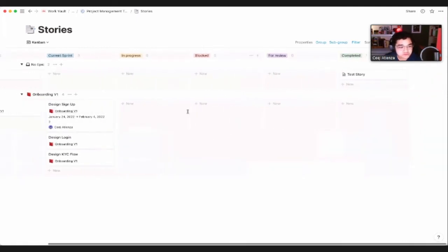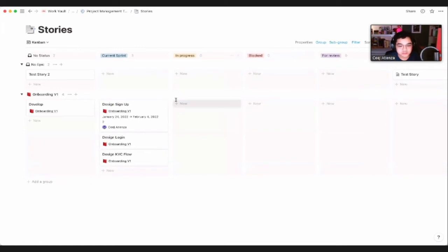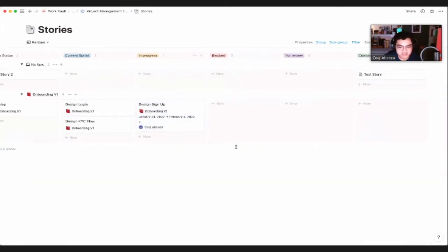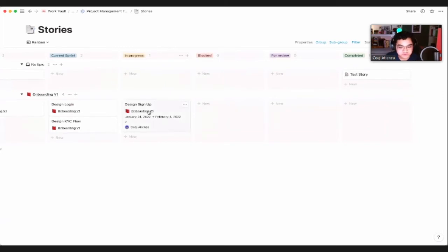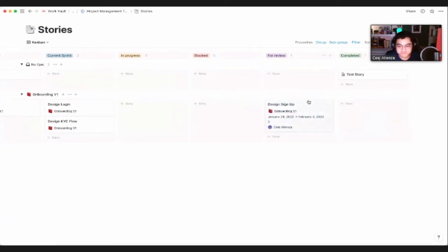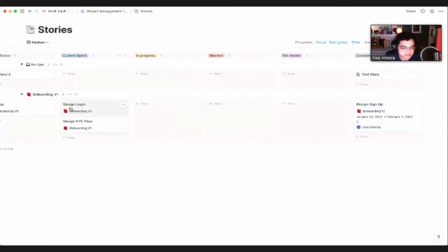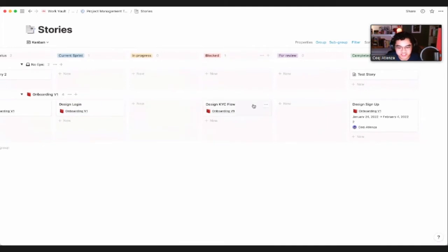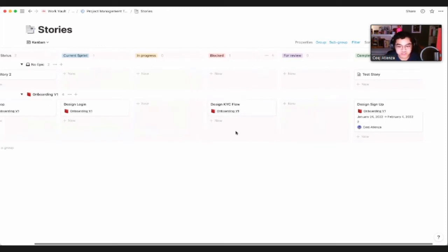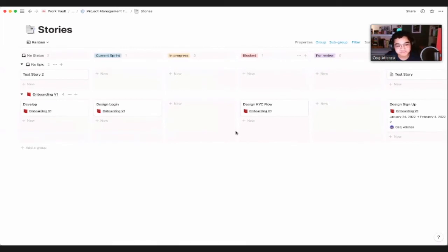The only caveat is this: you have to update it every time you work. So let's say I'm already designing the sign up, I'm going to move it there. Then all right, I'm good. I want my team to review what I'm working on, so I'll move it for review. After that, I'll move it to completed once it's good. We also have a blocked column right here. Let's say for KYC, given how hard this feature is, I'm going to move this to blocked. I need more help from the devs to understand the flow that we're going to be doing. So when you move something to the blocked section, this helps you communicate to your team that you need their help and support, that you might need to meet to get rid of this blocker.